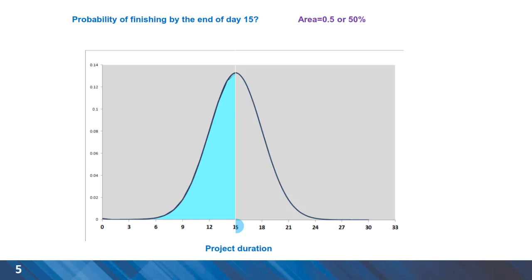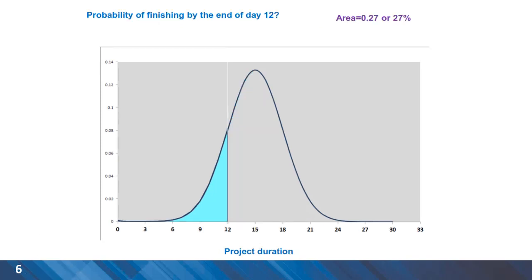For the CPM result of 15 days, we have a 50-50 chance of completing the project at this duration because of unforeseen situations that might happen. For any shorter duration such as 12 days, the probability will be less. In this case, the area under the curve is 27%, and we will talk about how this has been calculated shortly.